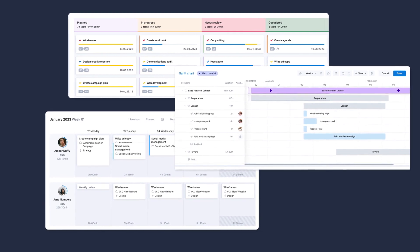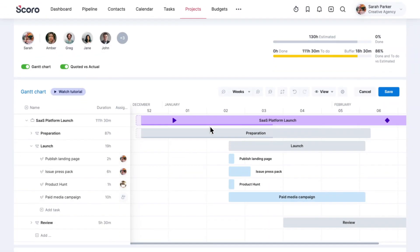Number one, Gantt chart. If you set a timeframe for tasks, but the team members are free to choose when exactly they work on a specific assignment, we recommend using the Gantt chart to assign tasks directly in the project view.